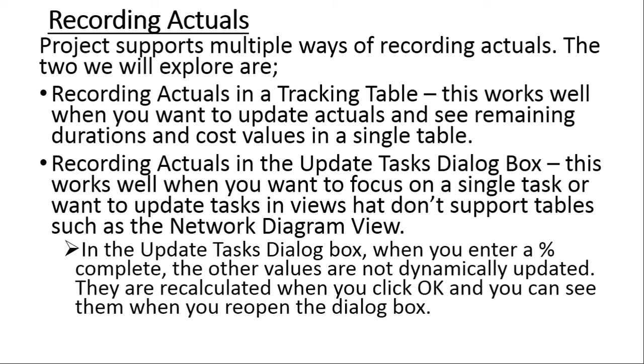It's similar to the tables that we were seeing when we were analyzing the cost of assigned resources. Remember the resource utilization table, the one that was showing the planned cost, the actual cost, the variance, etc. So it is similar, because the tracking table will show you the planned start date, actual start date, planned finish date, actual finish date, and then the differences.